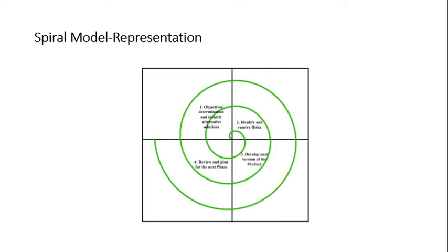Go for assessment, that is identifying or assigning the priority to those risks based on the severity as well as probability. Once you go for assigning the priority, then we go for resolving the risk. So it's a 3-step process. First of all, identify it, then go for assessment, that is assign the priority based on probability and severity, and the third one is resolve the risk. We also call it containment or abatement of risk. So this is the most important part relevant to your spiral model.